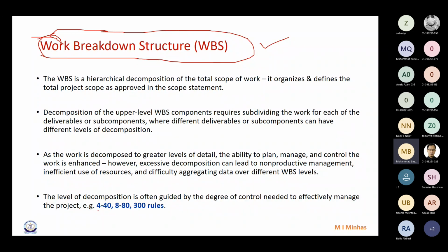One, can someone tell me what the 4/40 and 8/80 rules are? The minimum activity duration can be 4 hours and the maximum 40 hours in the 4/40 rule. In the 4/40, when we define activities, the minimum time duration can be 4 hours and the maximum 40 hours.